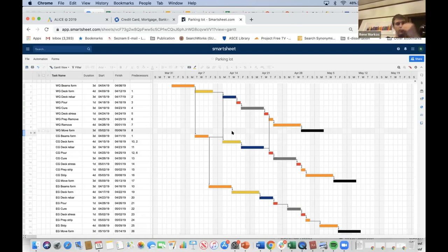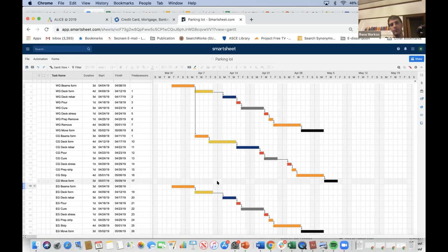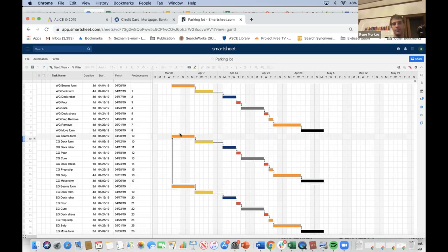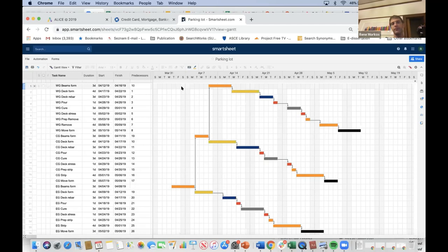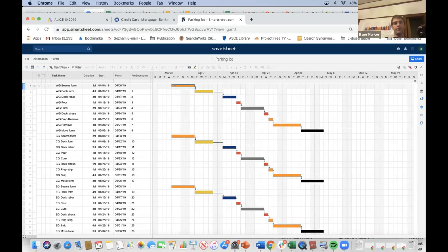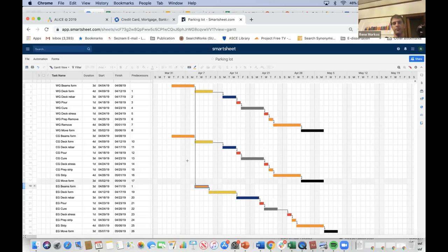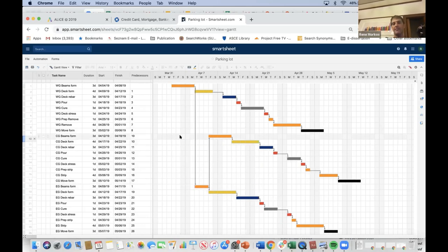Now, Bill might have known about this, but what's happened here is you've hard locked the west, center, east sequence. I'm going to do west first, then center, then east. Well, what about east, center, west? Alternatively, what about west, east, center? And that's what current tools today can't do: dynamic resequencing. They can't change the sequence of your project dynamically, if that makes sense. Any questions so far?